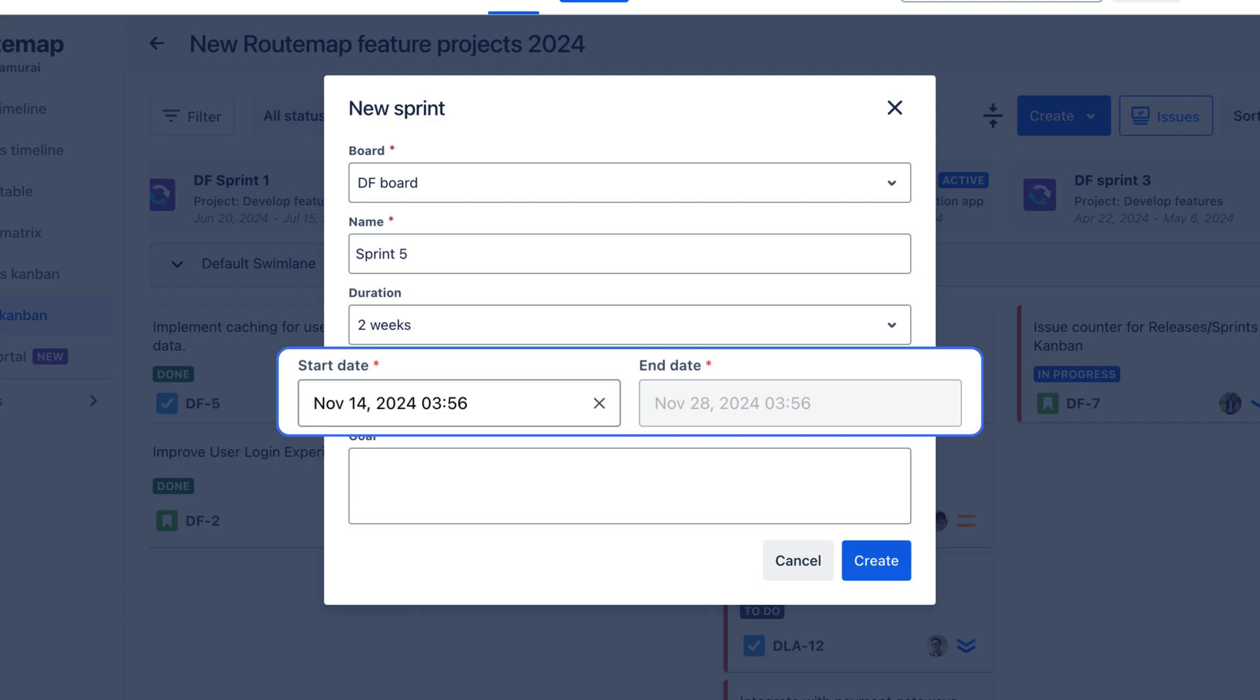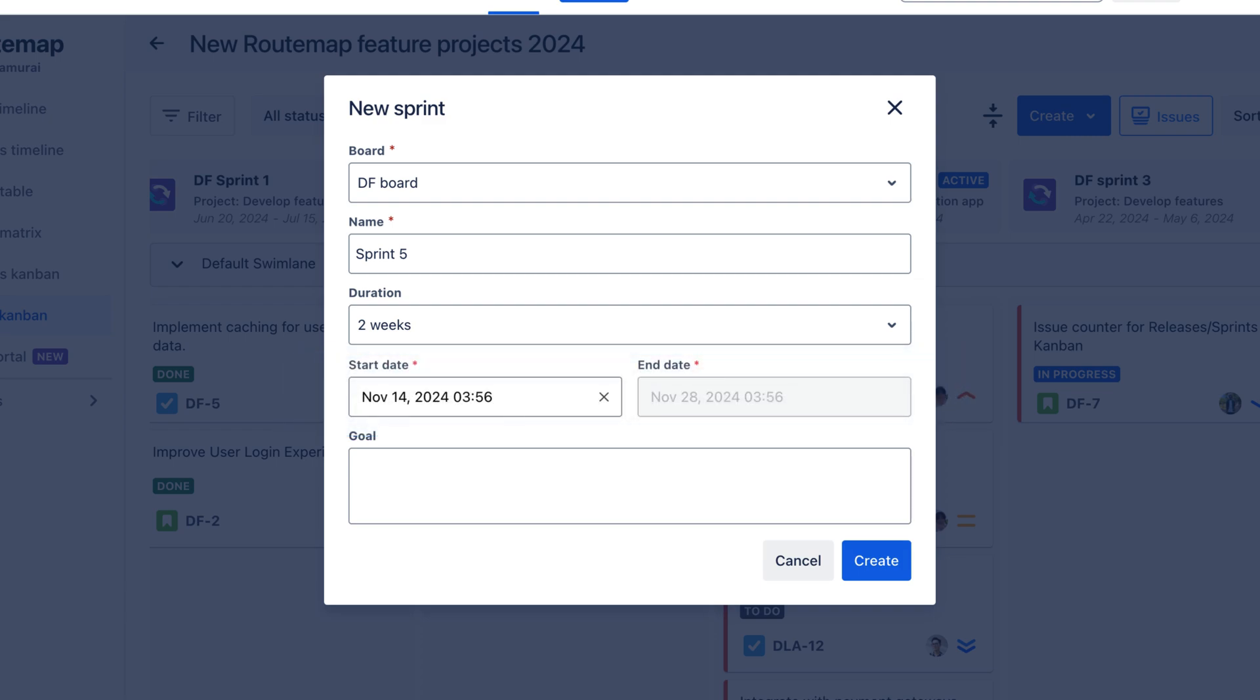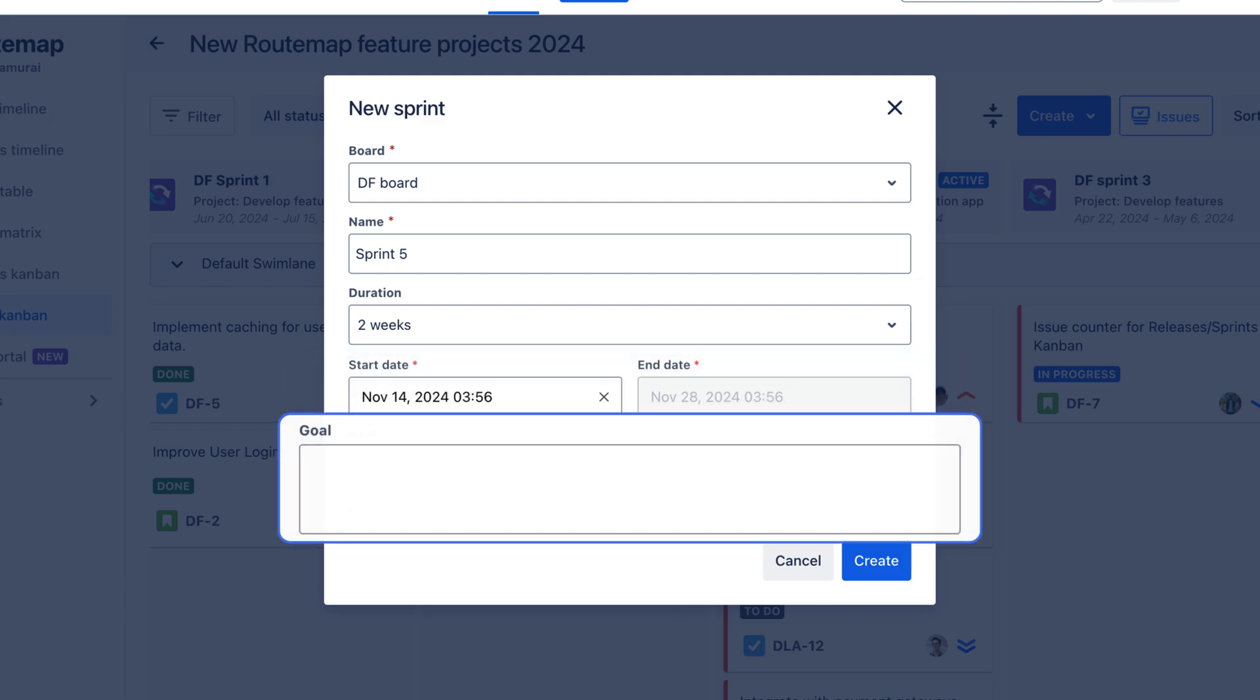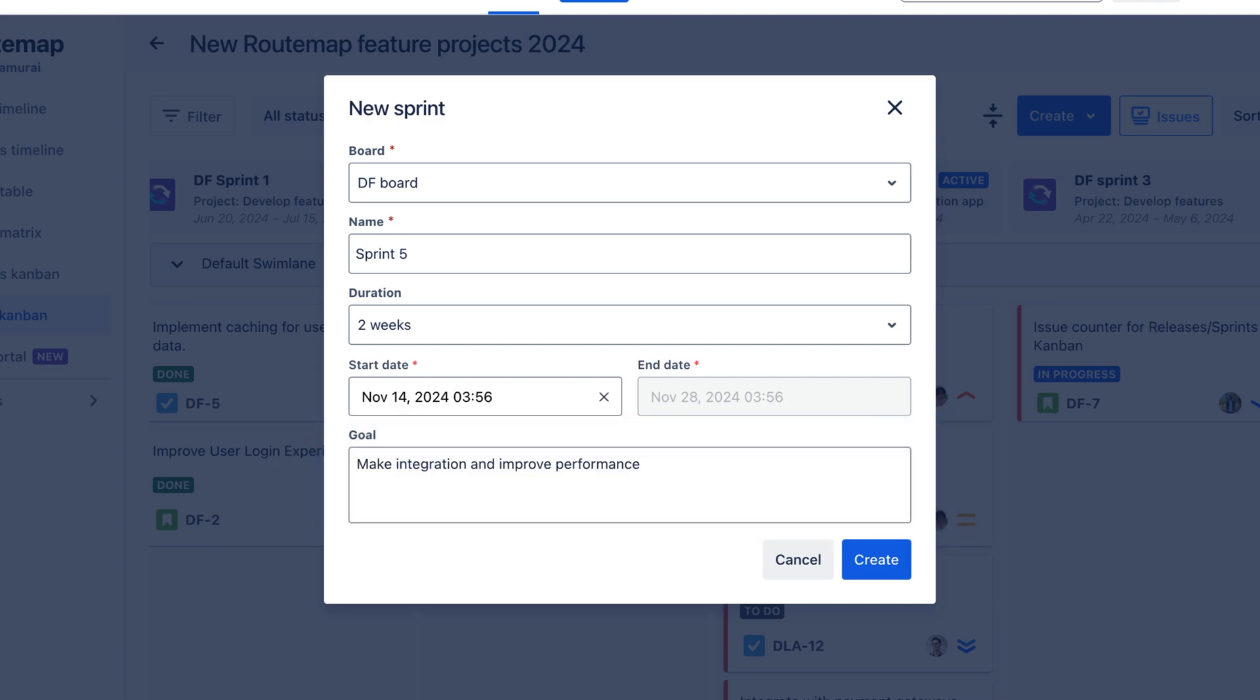The end date will be automatically updated according to the sprint duration. You can fill in the sprint goal to help all members understand what needs to be achieved. And that's it.